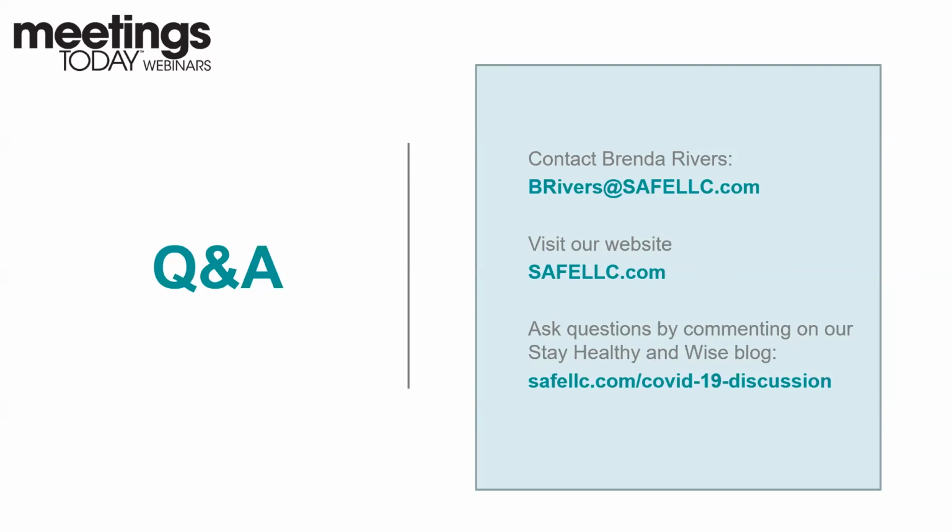And so they have a lot at stake when they have to give back registration fees, and they don't earn the sponsorship dollars. So it can be in the millions of dollars. And so the cost benefit of that kind of insurance was a valid one. But I can also tell you from experience, the first claim, it's just like anything else. The first claim you file, as in Sandy, then the next time you take that out, which, believe you me, the organization would always have it after they've experienced being able to recover from it through the insurance, your premiums double. They more than double sometimes, but it's based upon how much revenue you stand to gain by holding the event.